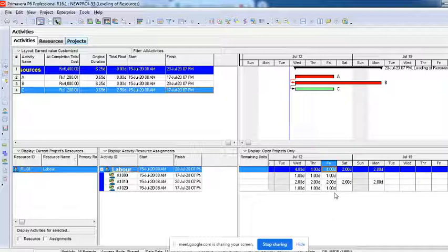You cannot go back to a change of scope. You will still have to construct the work that has been given to you. The moment you decrease the resources, duration increases. Sometimes if you keep duration constant and increase the resources, work will also increase. I will try to give you an example.